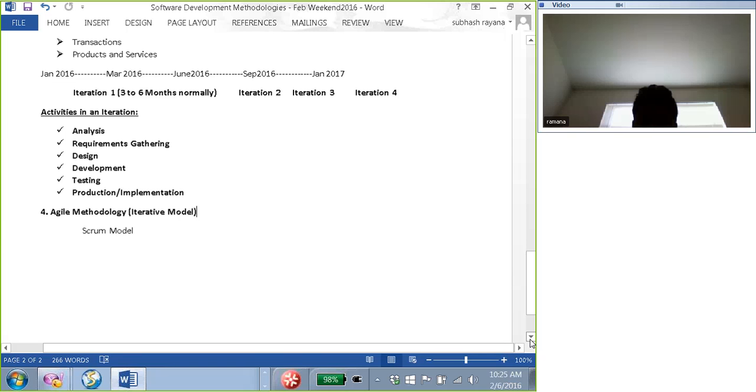Yeah. So there is actually a template for meeting minutes that has to be done from time to time. See, if you're talking about meeting minutes, normally as soon as you conduct the meeting, by end of the day, I would publish the meeting minutes, right? If I had a meeting today, I cannot publish the meeting minutes after 1 week. That doesn't make sense. The purpose of publishing meeting minutes is to summarize whatever we discussed today, right? And if you are publishing it after 1 week, nobody even remembers what we discussed.